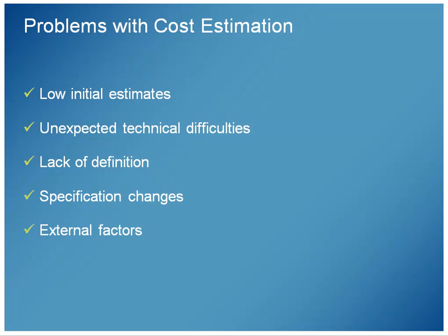Once something is a low project estimate, it's much more likely to be approved, and once a project's approved and there's some sunk cost in it, you're much more likely to be able to handle, well, this is a little more expensive than we thought it was, and oh, we missed that estimate, and the actual cost can go up.